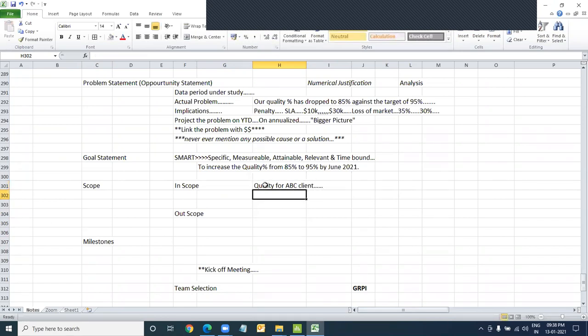Now, say your business operates out of multiple locations and you are operating out of, say, location A. Technically, you wanted to fix this project and you are only at location A. You wanted to fix that work for quality issues for ABC client at your location, but you never mentioned it. As a business owner, my understanding is that ABC client, anything that rolls up to ABC client, you're going to fix it up. But you have multiple locations, A, B, C, D, where you don't work.